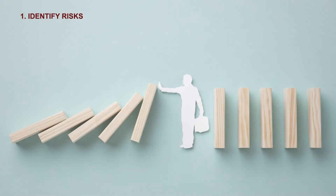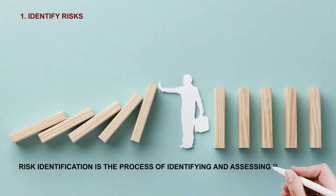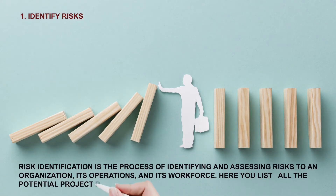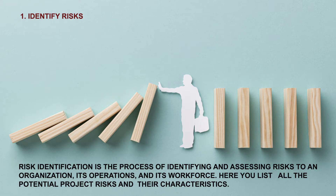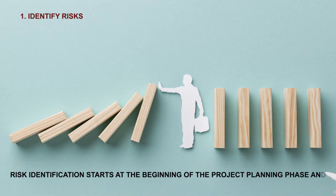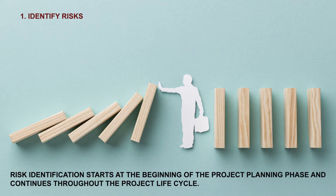Step 1: Identify Risks. Risk identification is the process of identifying and assessing risks to an organization, its operations, and its workforce. Here you list all the potential project risks and their characteristics. Risk identification starts at the beginning of the project planning phase and continues throughout the project lifecycle.